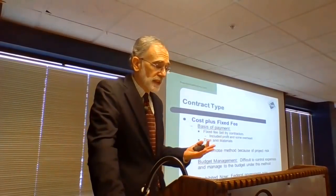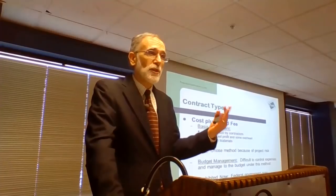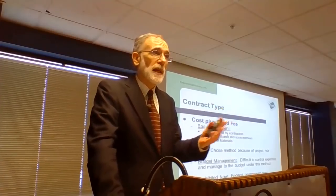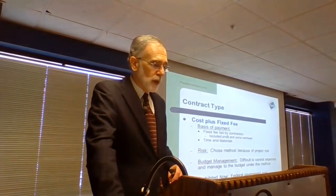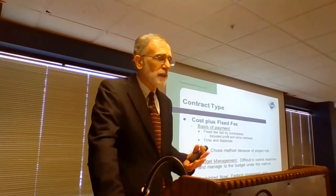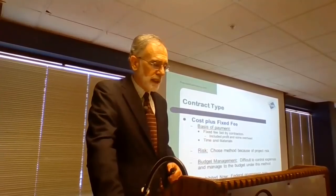Now, that's kind of a risky type of project. It's risky to manage a budget to that because the contractor might not be efficient. They might slow things down, try to make this a full employment program for a longer period of time. So it's difficult to manage costs on a project like that.